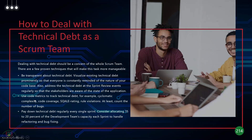When you talk about code metrics, there are some metrics available to track technical debt, like cyclomatic complexity, code coverage, quality rating, rule violations, and counting the number of bugs.